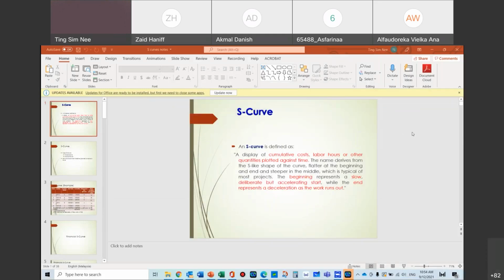So we have already gone through this type of parametric analogy. Analogy is capacity versus capacities. Order of magnitude is similar to analogy, based on capacities or the numbers or the length and all that. One parameter only. Then parametric is a few parameters.